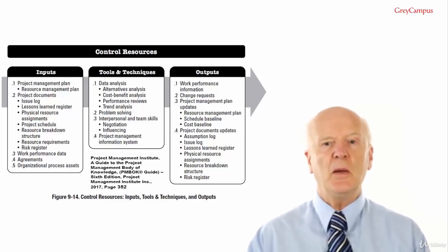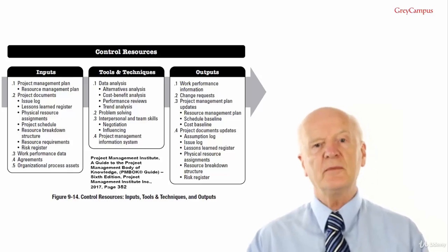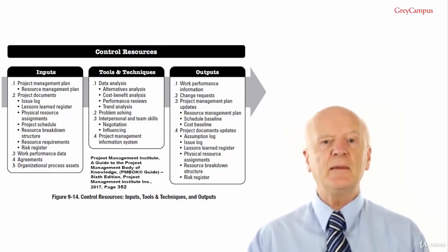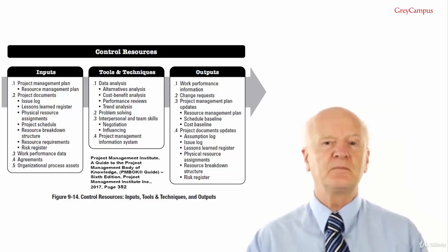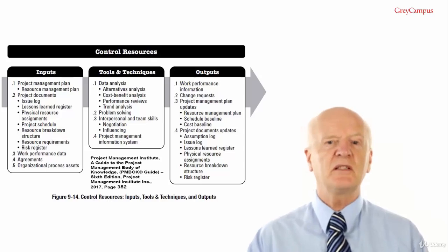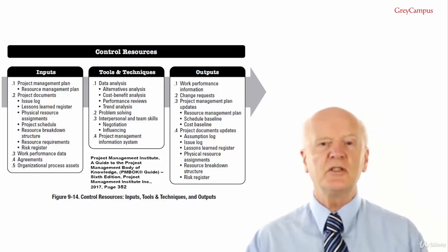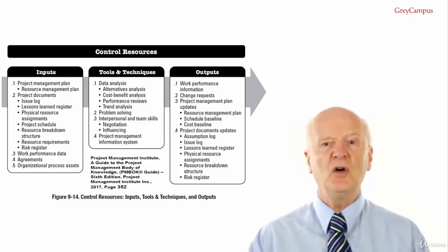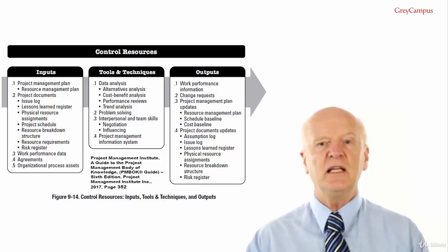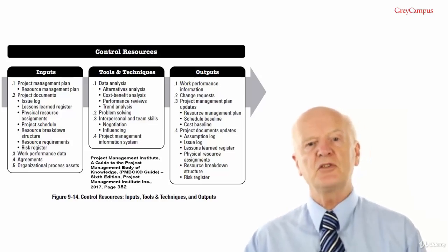Alternatives such as paying additional overtime or additional team resources can be weighed against a late delivery or phased deliveries, for example. This sounds a bit confusing because it sounds like we're controlling human resources, but what we're considering is bringing on more staff or getting them to work overtime if the resources are not being consumed quickly enough.